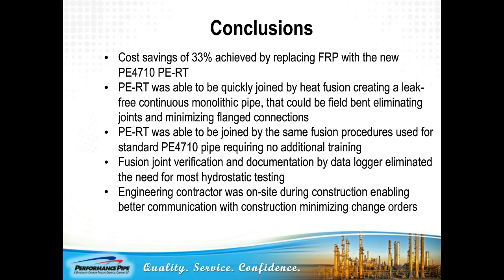Fusion joint verification and documentation by using a data logger eliminated the need for most hydrostatic testing. This was very valuable because the length of the runs to be able to fill these lines with water takes a very long time. Because they felt so confident in their fusion, because they had data logger verification and documentation to support that their fusions were made properly with the proper fusion procedures, they did not have to do nearly as much hydrostatic testing.